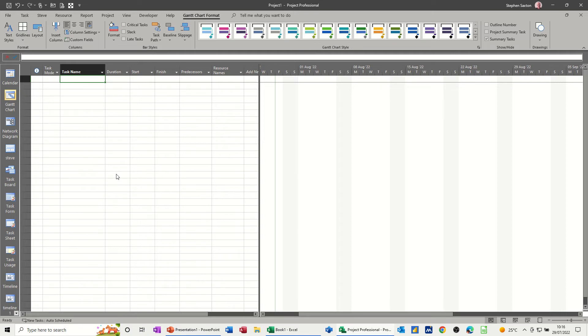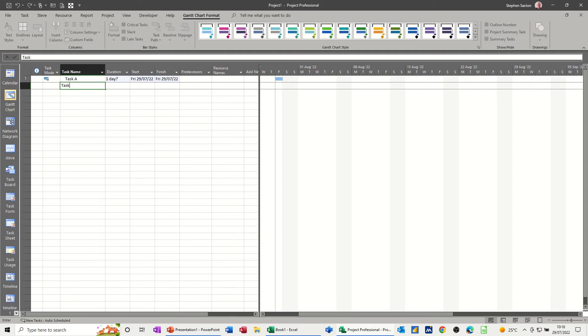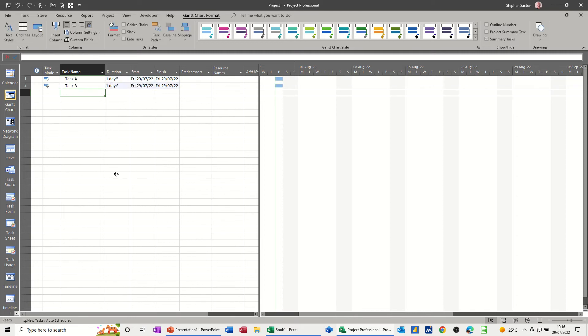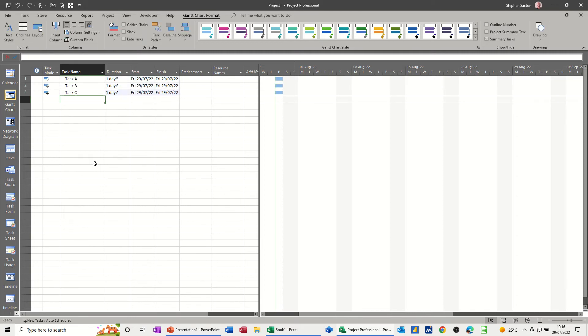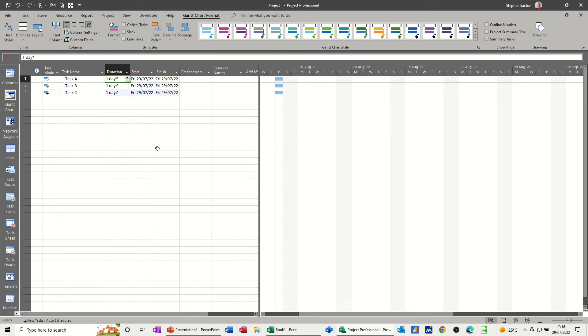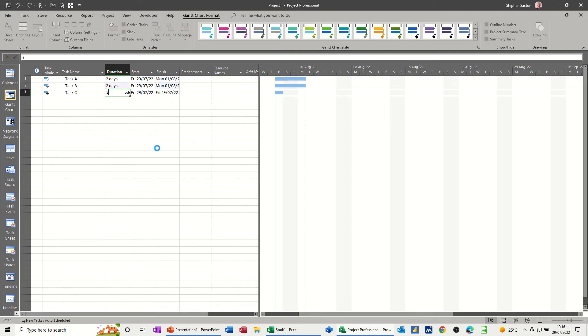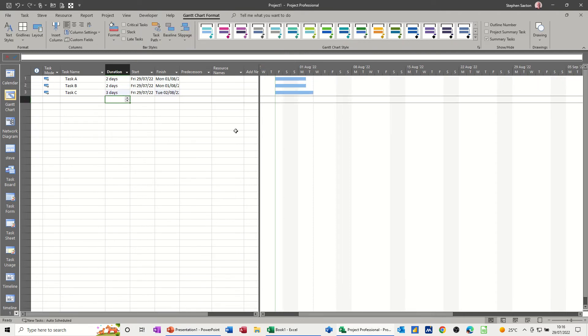So first of all, I'm going to create a couple of tasks, or three tasks: task A, task B, task C, and then allocate some resources to that. So if I just say these are all two, and that one's three-day tasks.